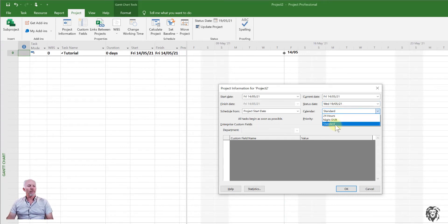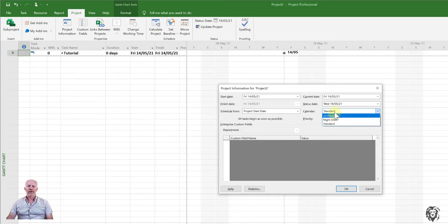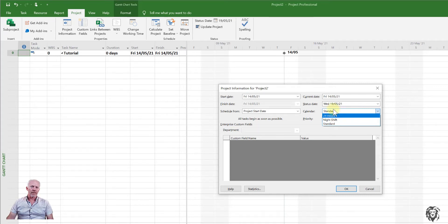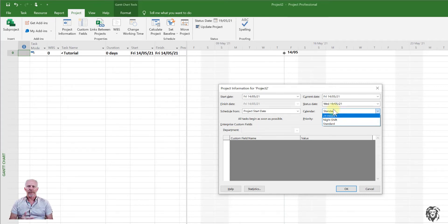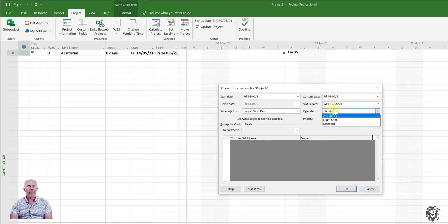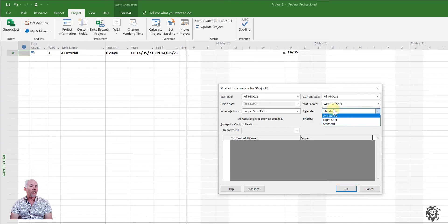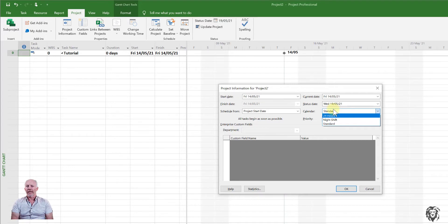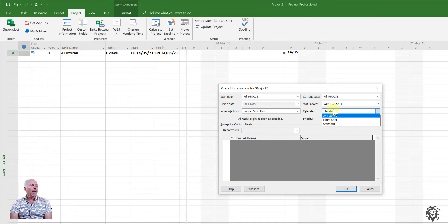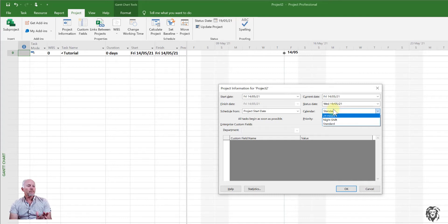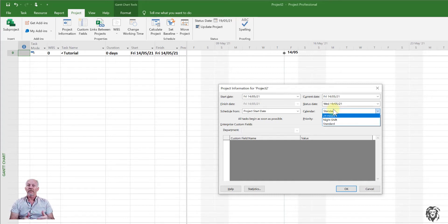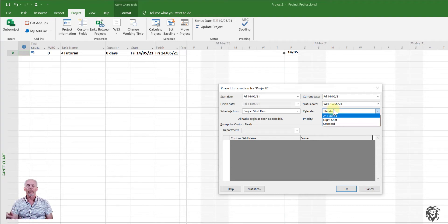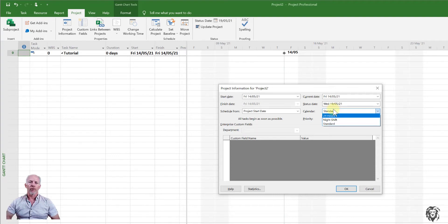But choosing the calendar is appropriate. Now we have three typical calendars in this particular template are available within this template. We have a 24-hour calendar. You're working 24 hours a day. You have a night shift calendar and the standard calendar. And the standard calendar is based on work weeks, Monday to Friday, eight hours per day, nine to five, I believe it is. So you want to get that correct. You want to make any changes to the calendar. And we'll do a separate video on how to adjust the calendar.